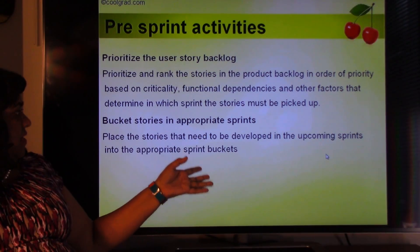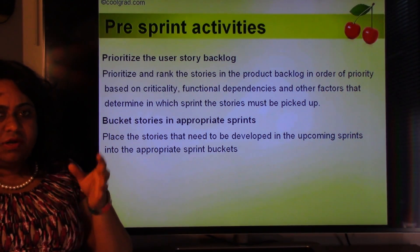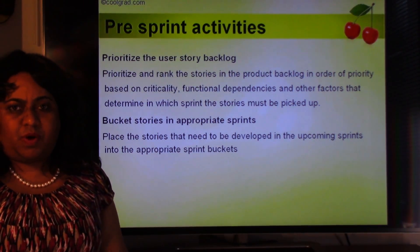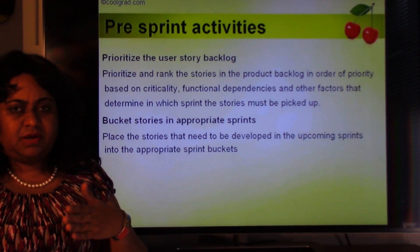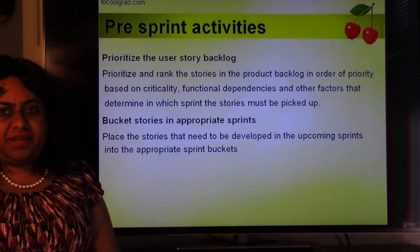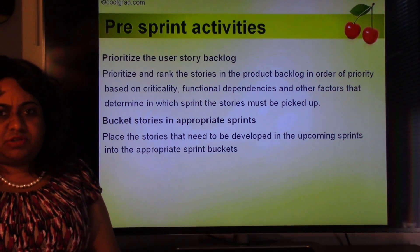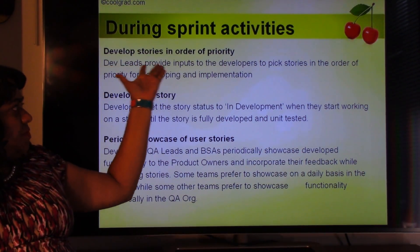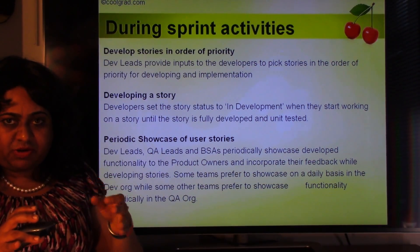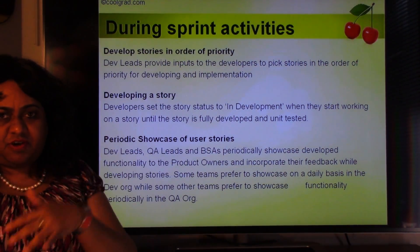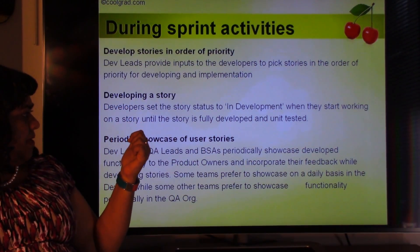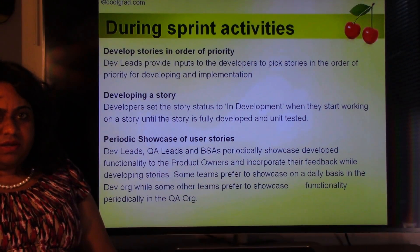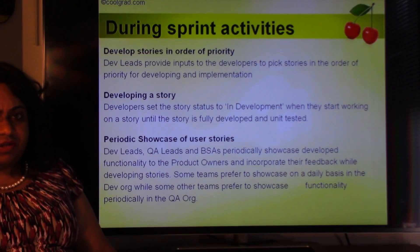During QA, defects are logged and there's something called a bug triage — a meeting that happens daily, twice a week, or thrice a week — where the team identifies the root cause of defects, assigns them to the particular developer to fix, retests, and closes them out. Once the story is QA complete, it's given to the product owners to retest and close. Before the sprint demo, the product owner plays around in the QA environment, logs any defects they find, and gets them closed. In the sprint demo, the entire team — or at least lead-level people — reviews the functionality, and product owners give their inputs and feedback on what's being done.